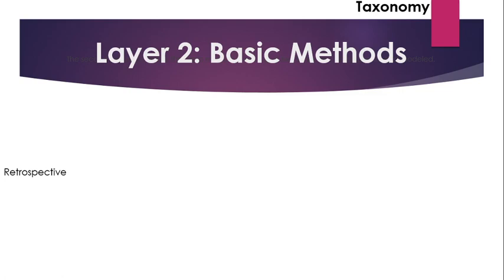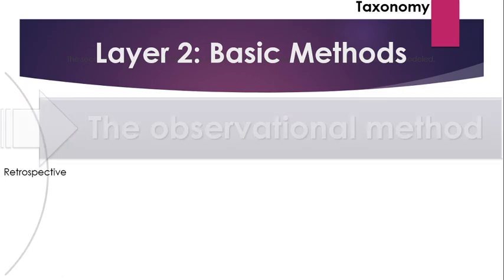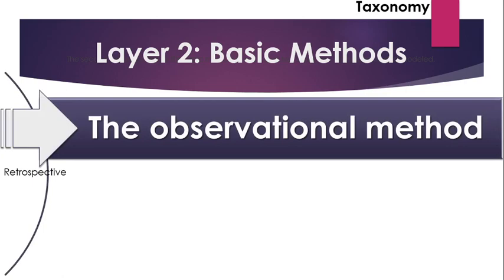The second hierarchy layer is the basic method, consisting of two branches, observational and modeled. The observational method consists of analyzing the schedule by examining a schedule, by itself or in comparison with another, without the analyst making any changes to the schedule to simulate any specific scenario. Contemporaneous period analysis and as-built versus as-planned are common examples that fall under the observational basic method.